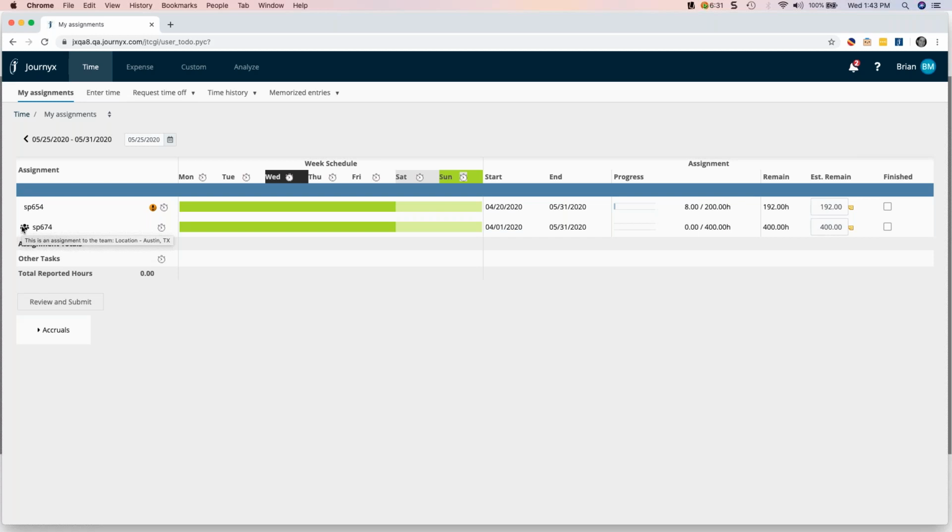The other option, and you do this at the task level, so I could choose this task to be self-assignable or not. If it's not self-assignable, then a project manager has to go and break up that team assignment to assign it to individuals when it's time to do the work. So it's just entirely up to you. If you are comfortable giving people on the team access to grab and start working things when it's time to go, then you can do the self-assign or agile assignment.